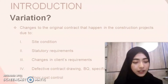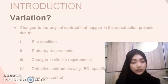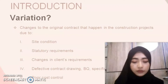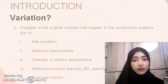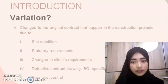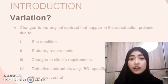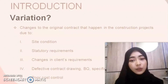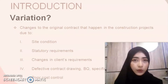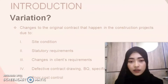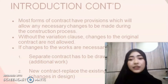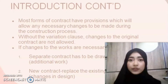What is Variation? Variation is an adjustment of the scope of work in a building contract in the form of an extension, removal or exclusion from the original work. The changes to the original contract that happen in construction projects are due to site condition, statutory requirements, changes in client's requirement, defective contract drawing, BQ, specification, and poor cost control. Most forms of contract have provisions which allow necessary changes to be made during the construction process.